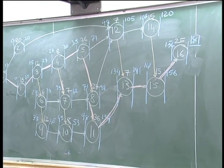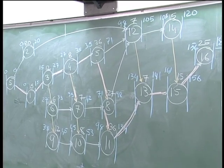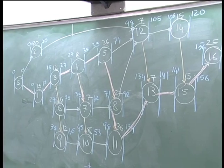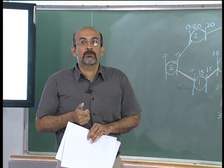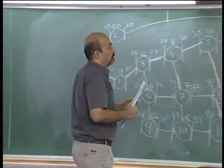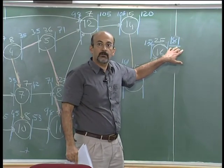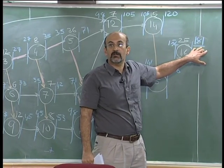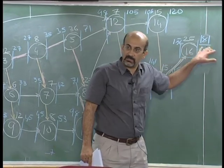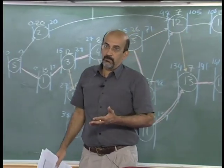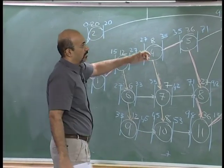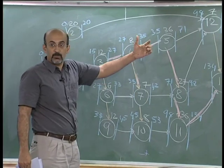It is a broad discussion. We have a separate lecture on resource management and resource allocation, but how can resources be managed and how do we actually do what we want to do on a project? Just out of curiosity of management, which network do you prefer? Why? Better resources we can complete it earlier. Look at the duration, look at the duration, what was the earlier duration? 118. 118. 163 days. So it is a lot more days because your resource constraints, acceptable.